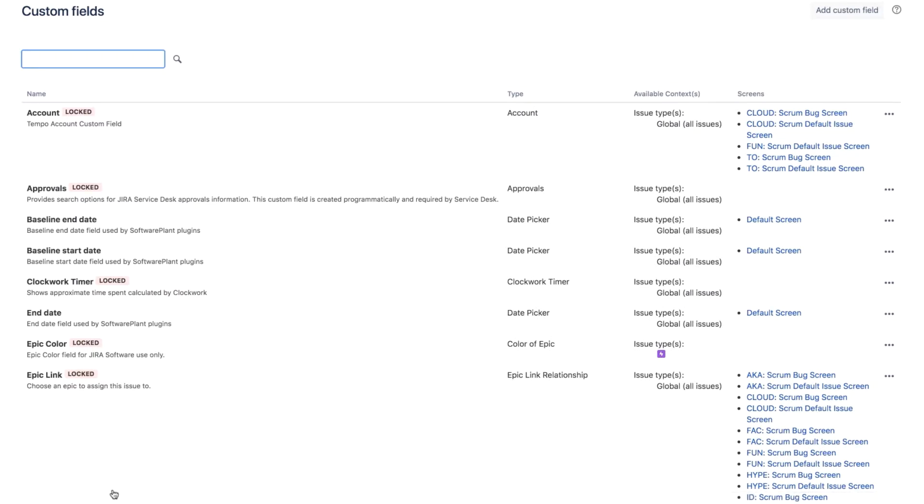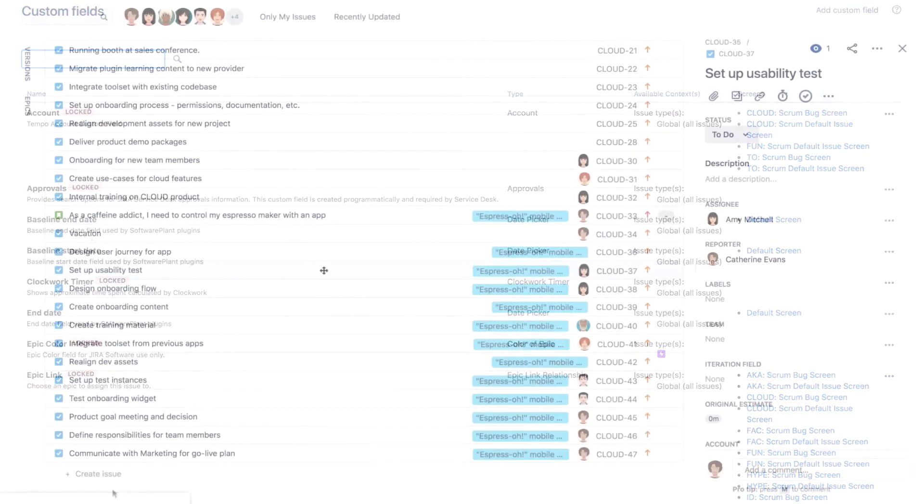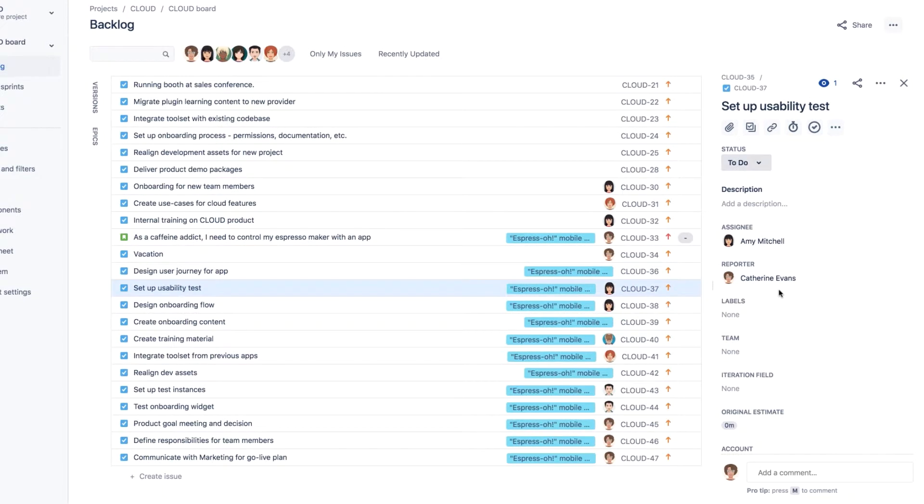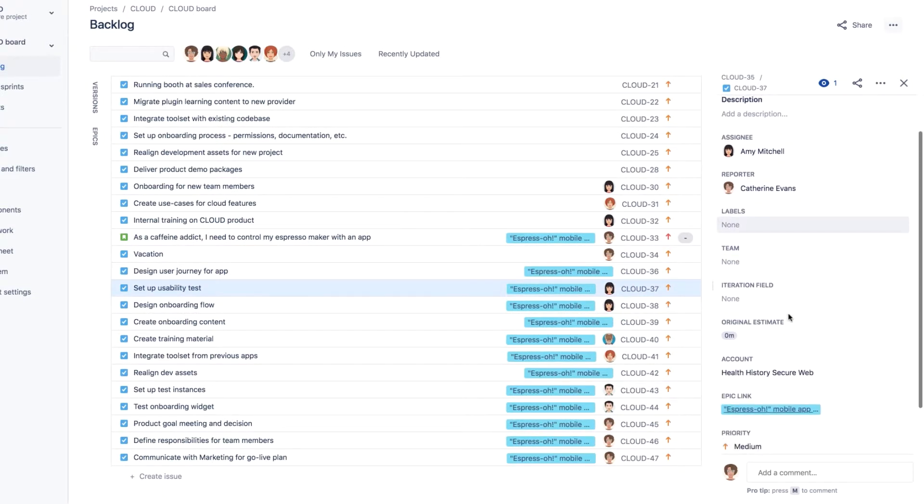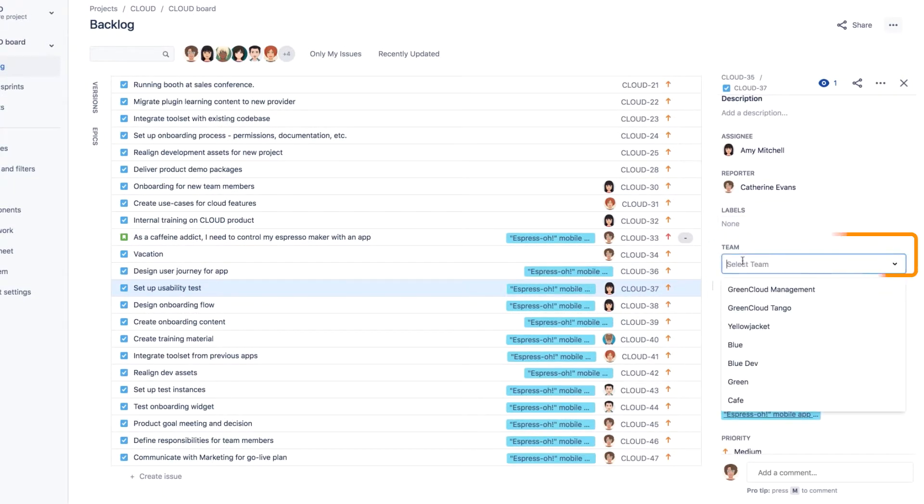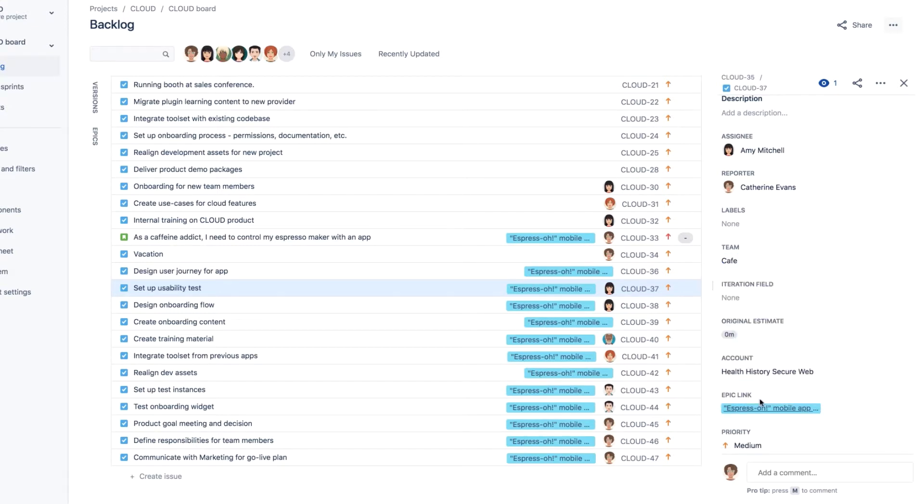Now I, as a team lead, can do something. In the cloud project, I'll open an issue for Amy here. And I see the Team field, so I select my Team Cafe from the list. And now my team is linked to this issue.